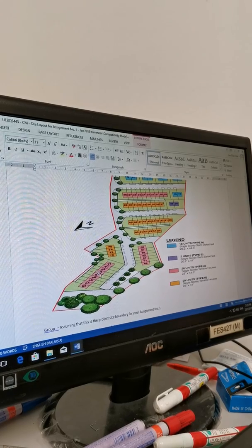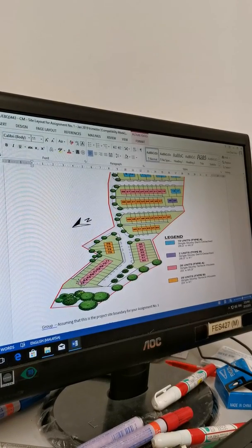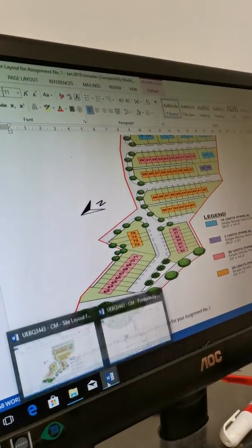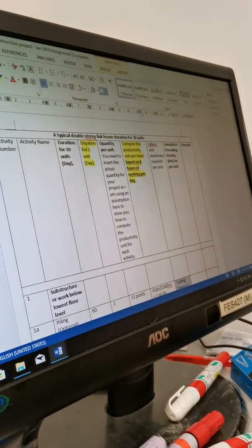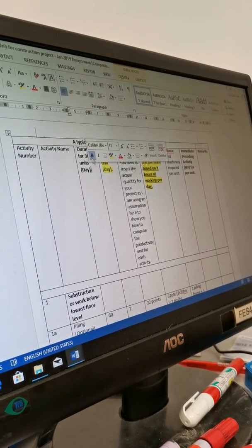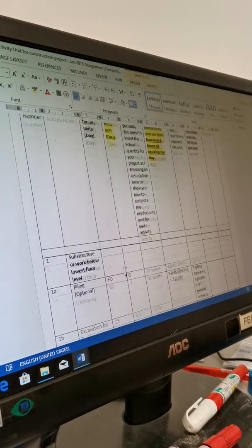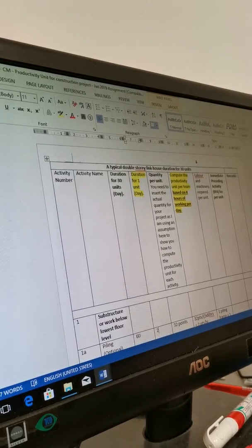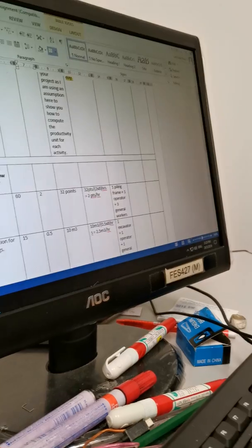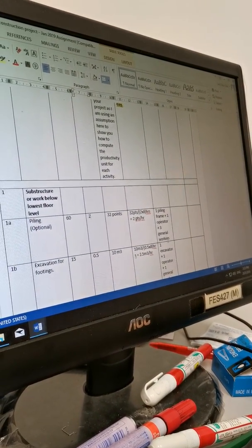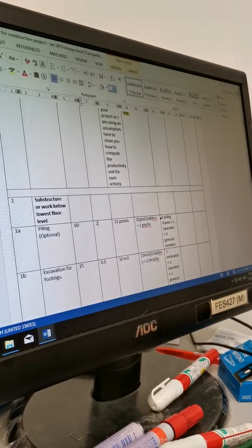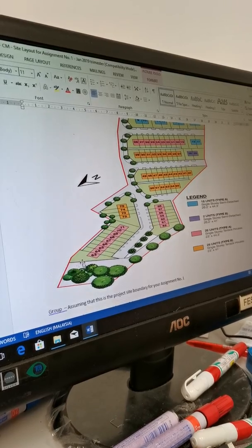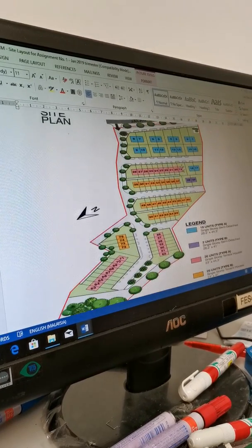This one you work as a 9, but then for your duration calculation, even if you calculate for 1 unit and this whole block, in terms of the whole block you look at it as the realistic duration. Whether it's 30 or 14 or 10, the duration is around here already. But the labor requirement, if you have 30, then most probably I will times 30. But for machine, I will look towards the per block basis. For labor, I repeat, if you have 100, from 1 to 100, let's say.